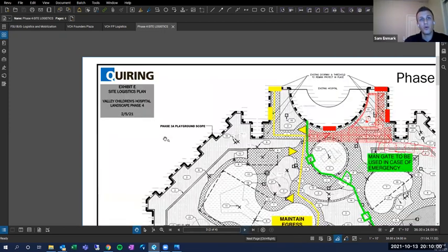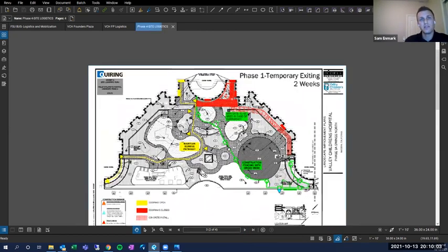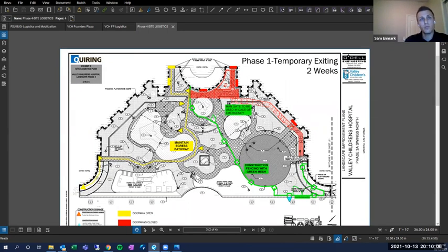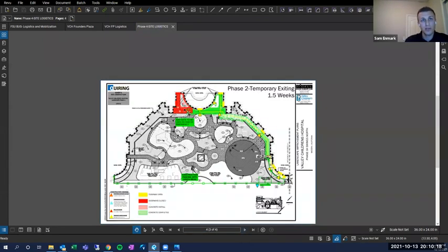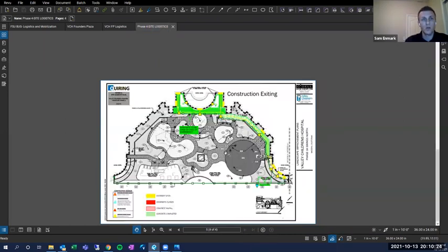So what we did is we showed a broken down version of this where, hey, this area in red, we're closing these doorways off and we're going to build this, right, while leaving exiting this way, right? And then in the next phase, we're going to flop it so where we're building this and allowing for them to exit this way, right? And then the last one was, hey, this is how we're going to do the remainder of the project. You'll have everything back up and open again and exiting through this way while we're doing all of this work in the center here. So less of a, I mean, it is a logistics plan, but also to help show clients and our trades phasing of the project.